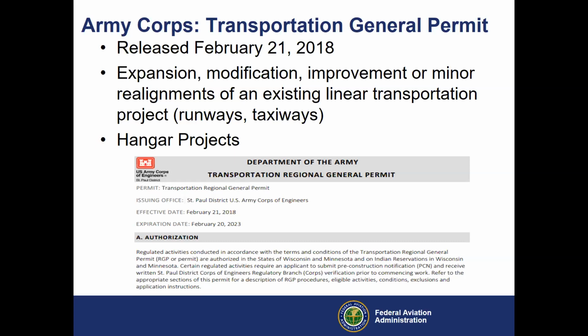However, this transportation general permit again goes up to that 3-acre-ish roughly threshold that says, well, we would still review this under a general permit, not an individual permit. So this could save us on doing an EA, and we might be able to review things under a documented CAT-X. So again, another great opportunity to save a lot of time and a lot of money.